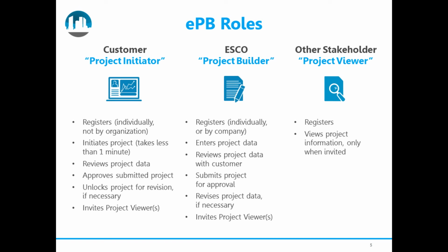We like to use a tennis analogy where the ball goes back and forth. It starts with the customer who initiates the project, and when the customer initiates a project, an email is generated and sent automatically to the ESCO, letting that person know that a project is available. Then the ESCO can, when they're ready, upload data. They fill in the data template. They upload the data. They can generate financial schedules as they need to for proposals.